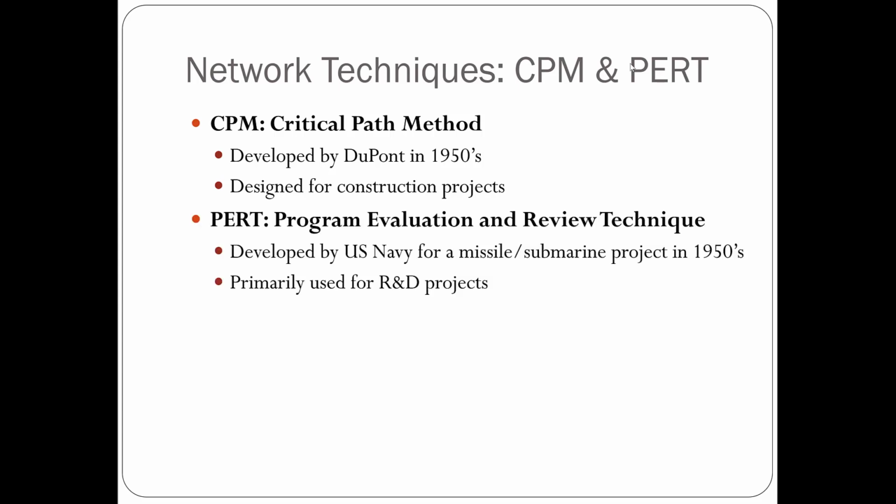And the PERT is called the Program Evaluation and Review Technique. It was developed by the U.S. Navy for missile submarine projects, also in the 1950s. And now it is primarily used for R&D projects because of the nature of those projects being with more variability and uncertainties.